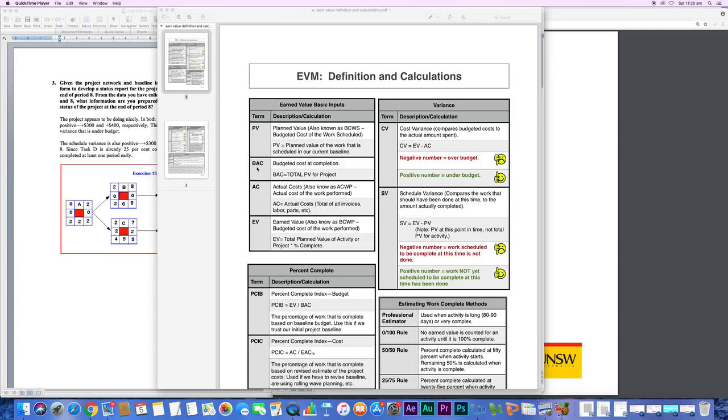Then we add the cost of work packages in one cost account, and we get the cost of one cost account. And then we sum up all cost accounts and get the budget for the total project. So that's basically another planned value. And all we do next is compare our actual with what we determined in the planning phase.